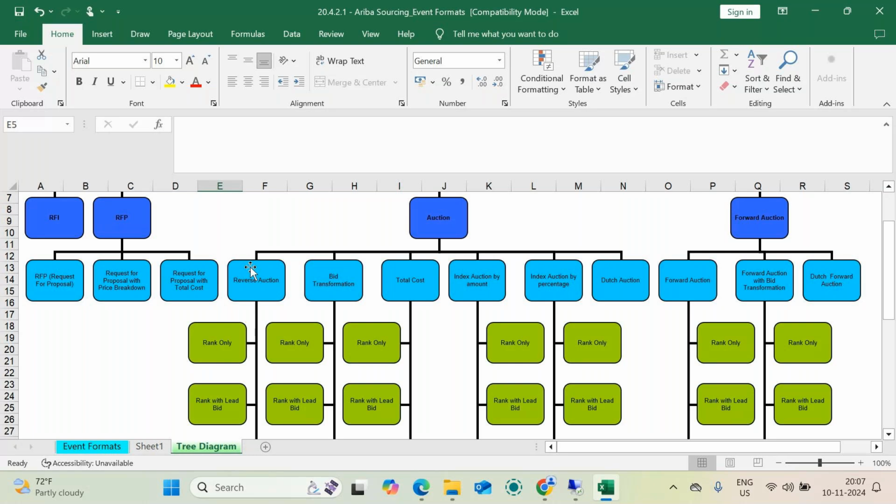Now how will we negotiate with the supplier? We will show them ranks L1, L2, L3. When the rank is shown, the supplier will understand: I'm putting in 10,000 rupees and my rank is L3. But if someone has given 9,500, he will be L2. If someone has given 9,000 rupees, that will be L1. L1, L2, L3 means we are decreasing the price, so that is called the bid decrement value. The pricing is going to the downward side, so that is called downward bidding.